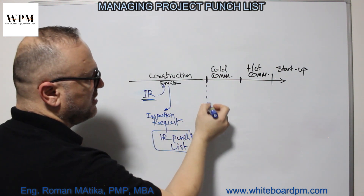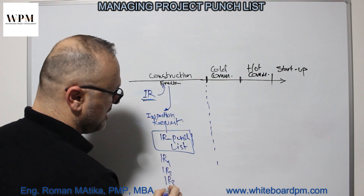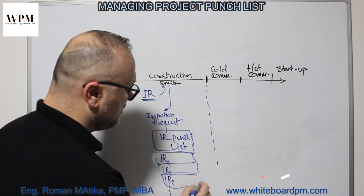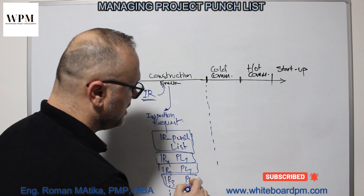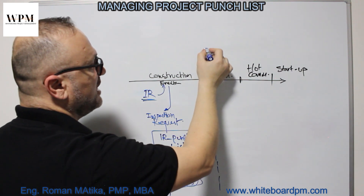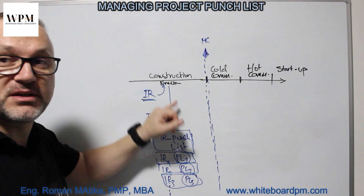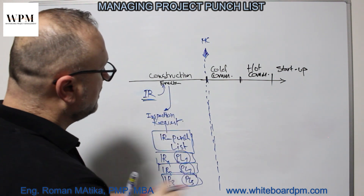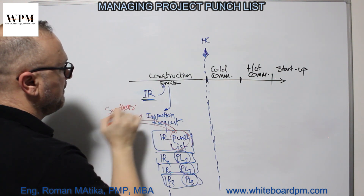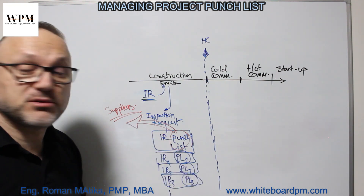By the end of the construction we have IR1, IR2, IR3, and so on. We have many inspection requests, and in each inspection request we have punch list 1, punch list 2, punch list 3, and others. All those punch lists are completed once the construction phase is ready and we have the milestone of mechanical completion. Once we have mechanical completion, all punch lists must be ready. Some punch lists need to be reported to our suppliers — some items are not supplied properly, or materials are not according to specifications.